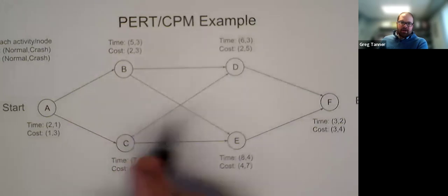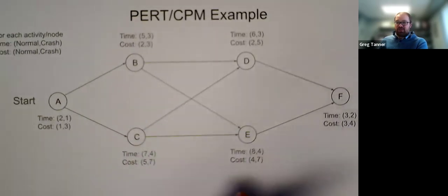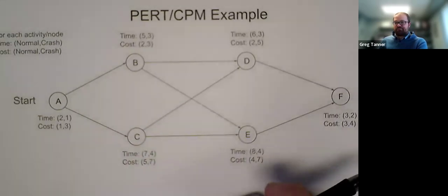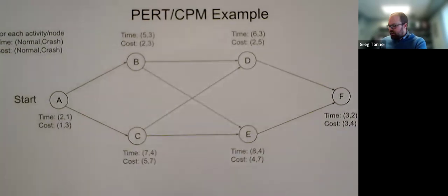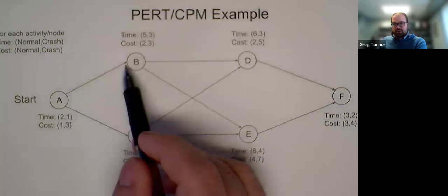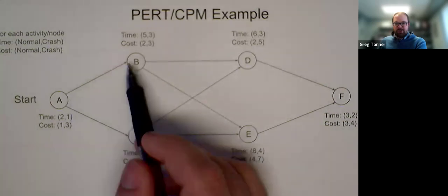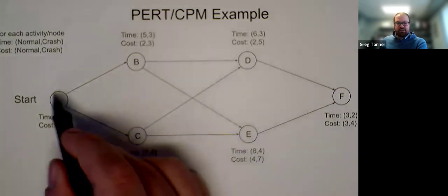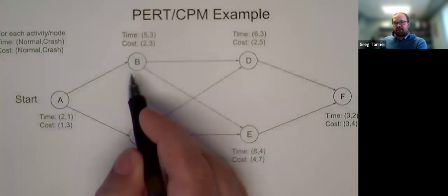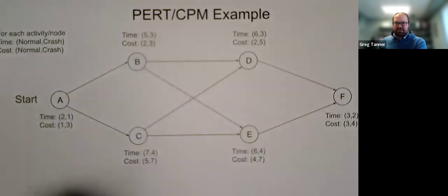Okay, and so here we're using nodes to represent activities, steps in your project or program. And the arcs or the links are directed arcs that represent the kind of precedence, and that A must be completed before B can be started. Okay. This is one way of representing them.